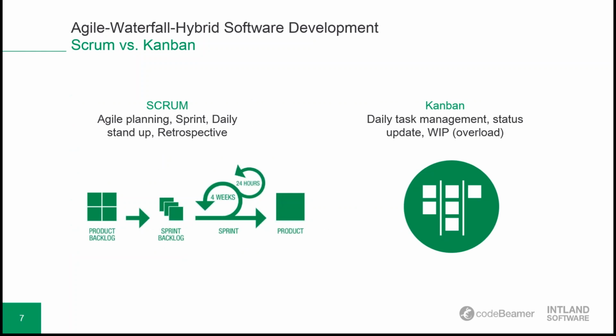So Scrum focuses on small, cross-functional, self-organizing teams, requiring team members to split the work into a list of small, concrete deliverables, then set priorities and estimate the relative effort of each item. Scrum is based on short, fixed-length iterations, usually 1 to 4 weeks, with potentially shippable code demonstrated after each iteration, and uses a retrospective to optimize the process after each iteration.